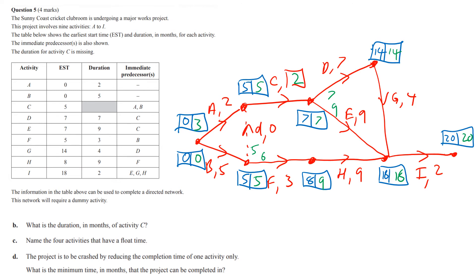Highlighting the critical path nodes, we can identify the path that includes all the matching EST/LST values. The activities that don't have a float time — i.e., not on the critical path — are A, F, H, and E. I initially said D by mistake — it should be E. So A, F, H, and E are the ones not highlighted on the critical path.